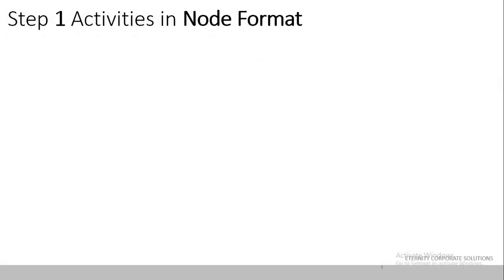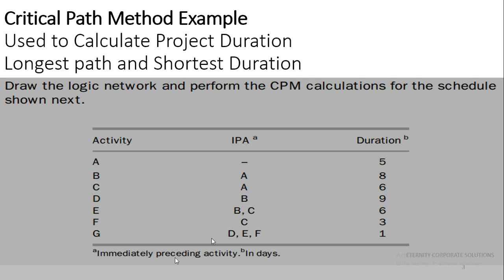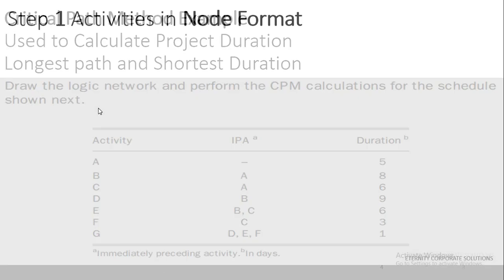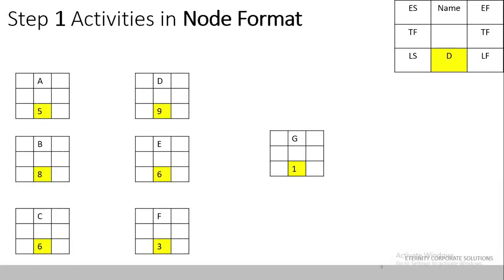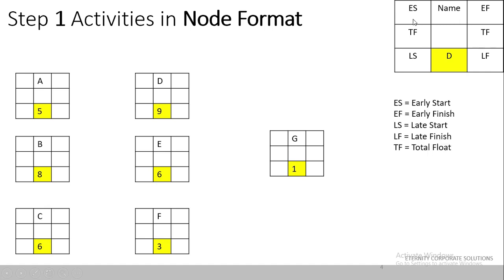In Step 1 we will convert these activities into the node format. On the right corner you can see the legend which shows the different components of the activity node. In the middle we have the activity name. On the left-hand side we have the early start, then early finish, then late start, late finish, and in the middle we have the total float.